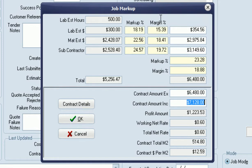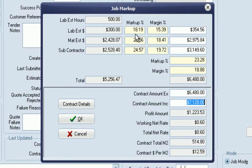we could add more stock in, and the system will try to maintain these margins. So the price will be changing as we add more stock in, but we'll be trying to maintain the margin on the labor, the materials, and the subcontractor, each at their own isolated rate.